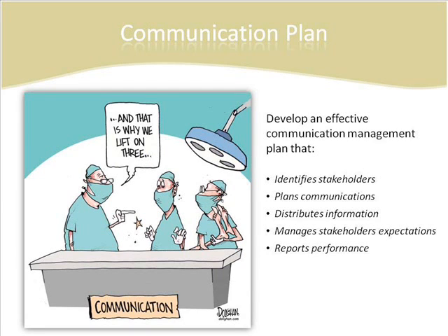The Communication Management Plan is a written document that outlines the details of a project's communication needs and expectations. This includes specific communication technologies that are required, such as the need for dedicated equipment like cell phones and laptops, so that project team members can keep in touch. This may also include specifications for update schedules, for instance, setting up weekly email updates or monthly status update conference call.